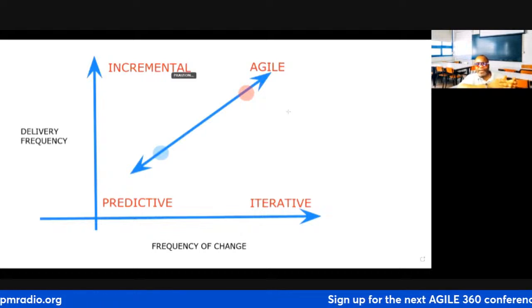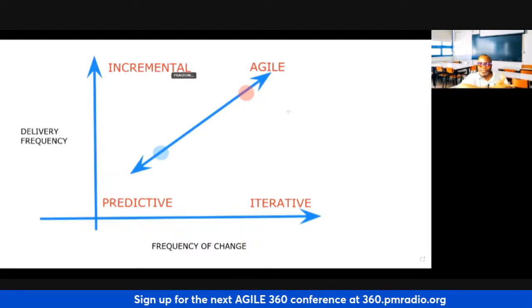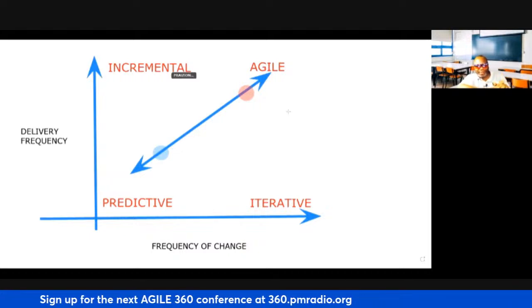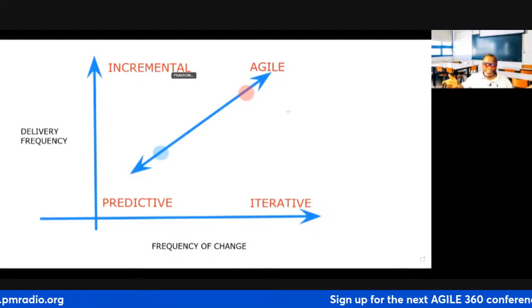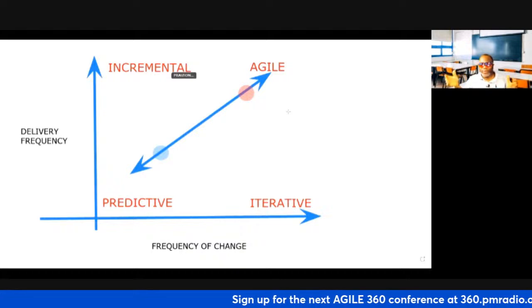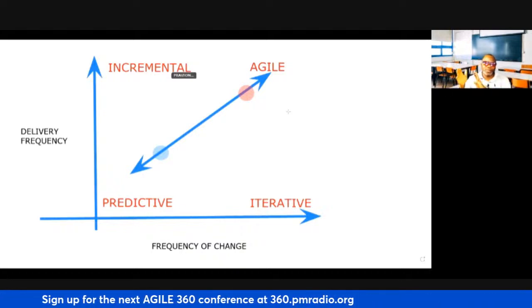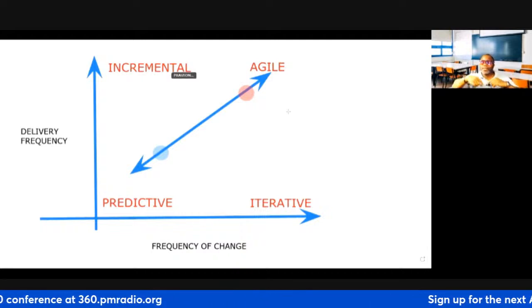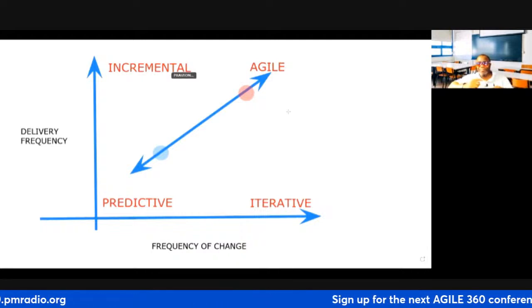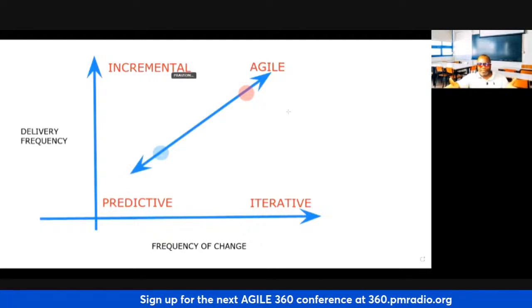So if you combine a phase gate approach, where you're meeting at the end of every phase, phase gate plus daily meeting, that's hybrid? Because in Agile, we don't do phases. But if you're on a project where there's phase gates and you need approval before you can proceed to the next phase, and then daily you're meeting with the team to do daily stand-ups, that's hybrid.